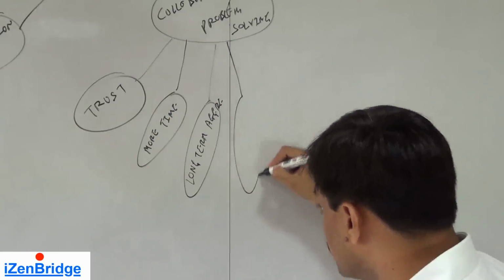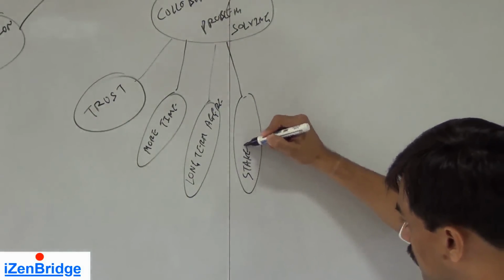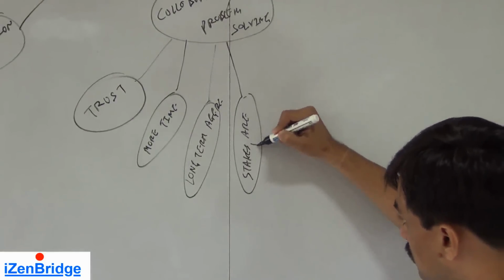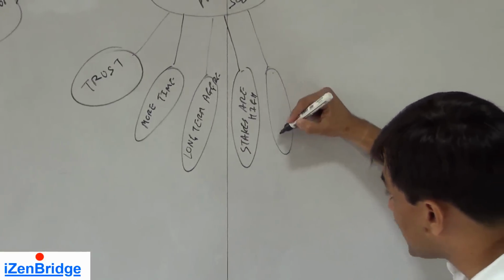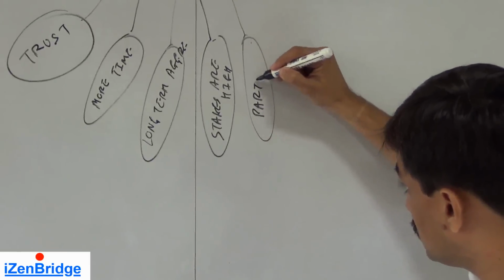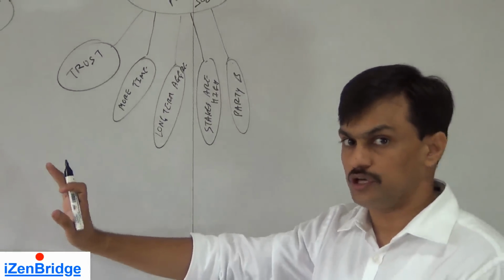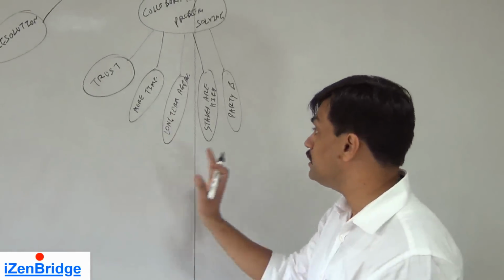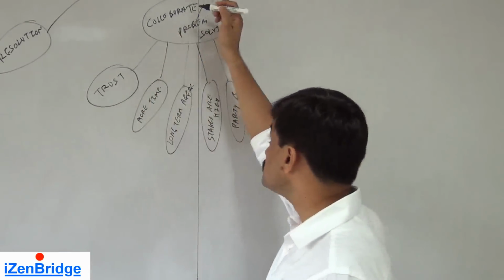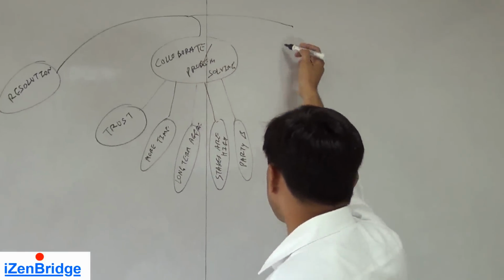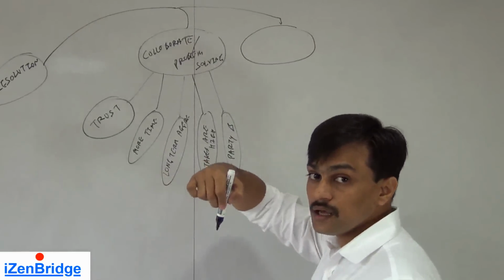This approach should be taken when the stakes are high, and we also care about the second party, team B. So it's not like whatever you want to do, I will not do it. If we really care about team B, then we should go for a collaborative and problem solving type of conflict resolution. A second type of conflict resolution technique is compromise.